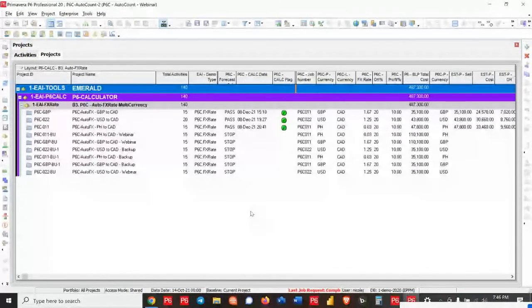So often they're integrated. And in this example, I'm going to touch on multi-currency. This is a challenge inside of P6 because the multi-currency handling is not very strong. We get to set one currency conversion, which may not work, right? And you get to set whether a project is one currency, and that's about it.